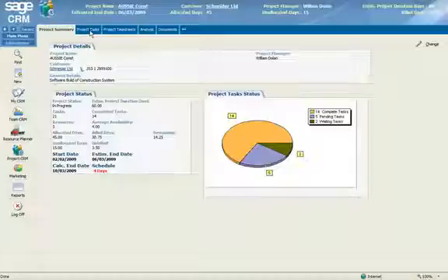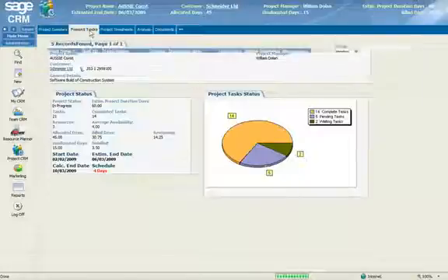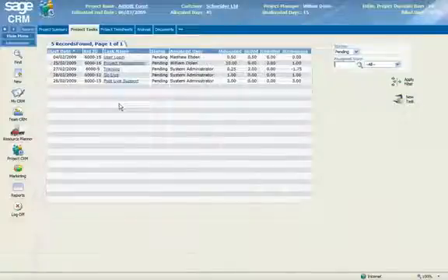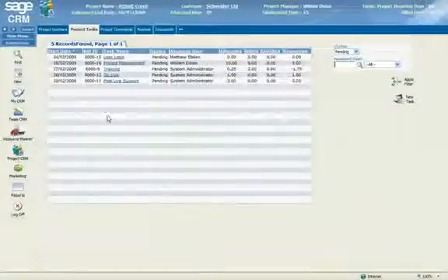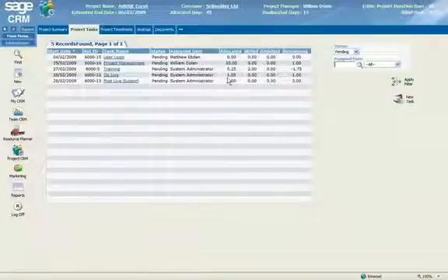Okay, let's look at starting to plan the project. For any project there is a series of project tasks, and those project tasks are available for you to plan, as the project manager, according to what breakdown and sequential tasks you have. Every task has a start date, reference IDs, obviously a name and status, who it's assigned to, and you can see in the summary details here it gives you an idea straight away of what you've allocated against that, and then billing and unbilling time. We'll explain billing and unbilling in a moment.